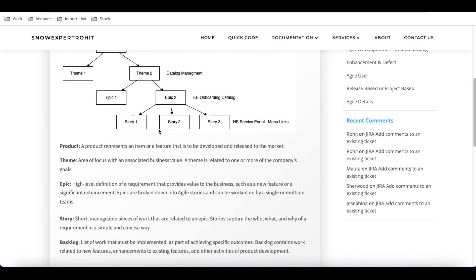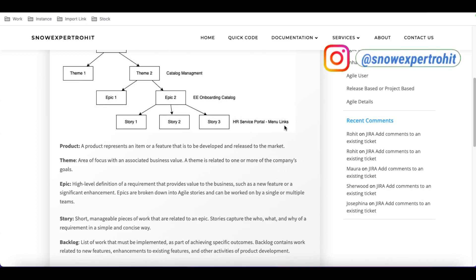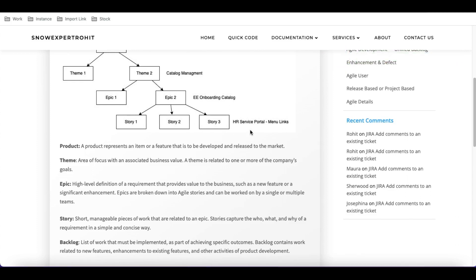Under an epic, we have stories. A story is the detailed description of each piece of development that has to be done by a developer. For example, service portal menu links. In a story, we define each use case — what the features should be, what the test cases are — and that story is assigned to a development group and then to a particular developer.